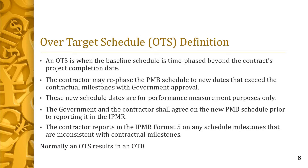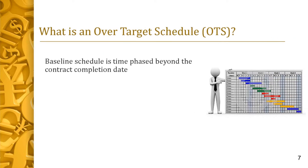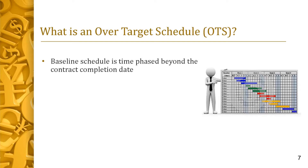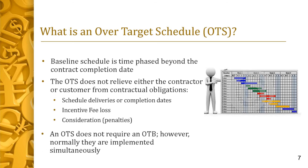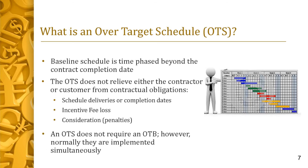While an OTS may be implemented without adding additional budget, normally an OTS also results in an OTB. An OTS is when the baseline schedule is time-phased beyond the project completion date. When the planned completion date for all remaining contract work results in a forecasted date well beyond the contract completion date, an over-target schedule should be considered. The OTS does not relieve either the contractor or customer from contractual obligations such as schedule deliveries, completion dates, incentive fee loss, or penalties. Typically, an increase in schedule will also require an increased budget allocation. Therefore, an OTS and an OTB are normally implemented simultaneously.